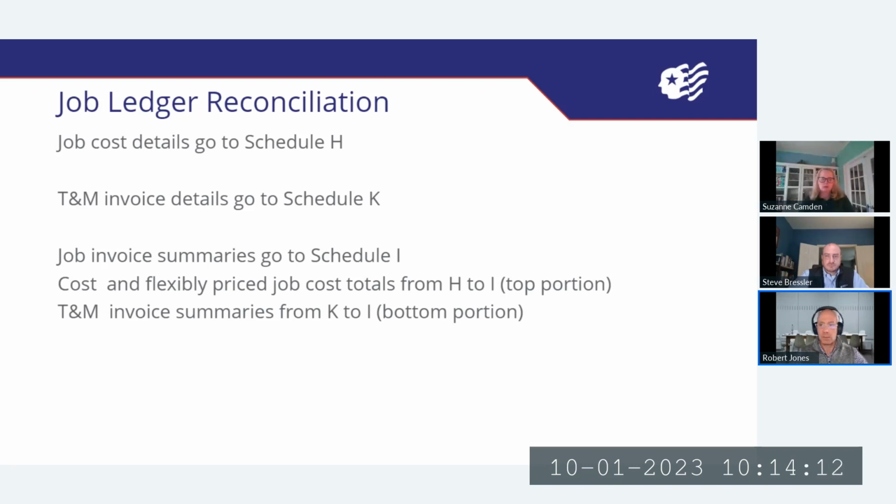For T&M jobs, we do have to have that detailed information. And so that is the labor category, the quantity of hours, and the rates by labor category that go across and give us the total amount that was billed by labor category by contract. That's one of the areas that we find a number of clients struggle with.